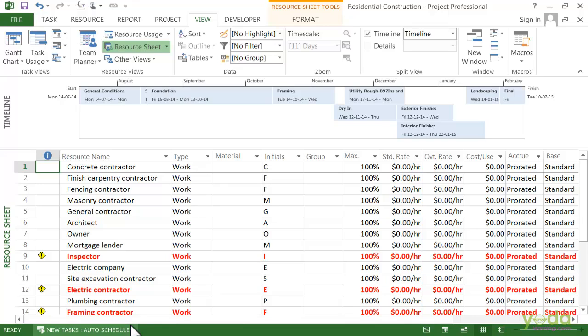If you noticed, there is no cost involved in the resource sheet, and that means you actually apply the cost when you assign the cost resource. The interesting thing about that is that a cost resource can vary every time you assign it, which is really good because airfares will be different almost every time.